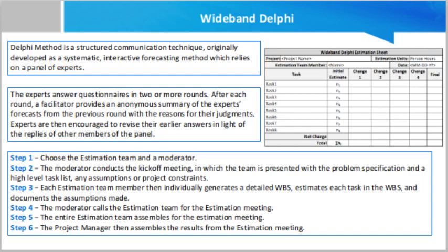The steps of the Wideband Delphi technique: Step 1 — choose the estimation team and moderator. Step 2 — the moderator conducts the kickoff meeting, in which the team is presented with the problem specification, a high-level task list, and any assumptions or project constraints. The team discusses the approach to the problem and any estimation issues. They also decide on the units of estimation. The moderator guides the entire discussion, monitors time, and after the kickoff meeting prepares a structured document containing the problem specification, high-level task list, assumptions, and the units of estimation decided. He then forwards copies of this document.